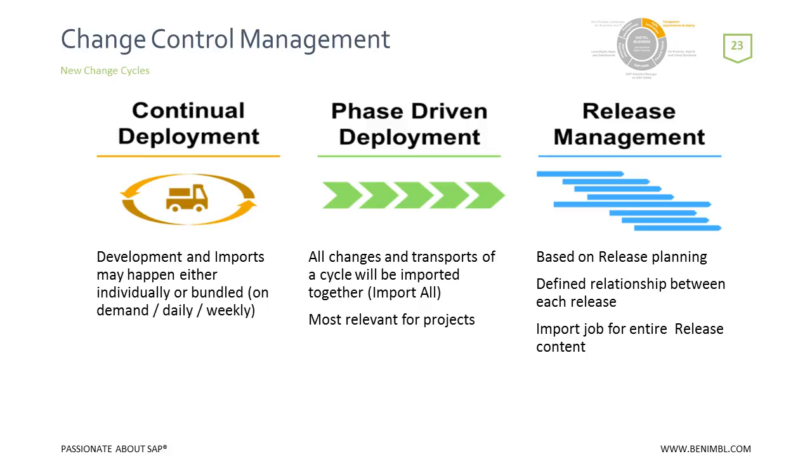Okay, and for larger projects, so when you say you're going to implement a whole different tool set to work with your ERP environment, that would normally go into a separate implementation project that you can now put into a release management cycle. And the good part about the release management cycle is that it will allow you phased deployment of your changes. So you can have multiple phases on your project, and you can deploy into production by those different phases. Okay.